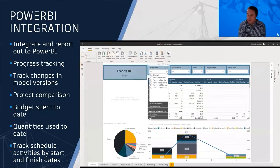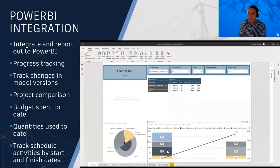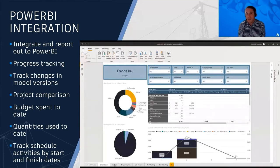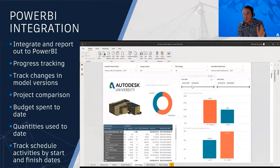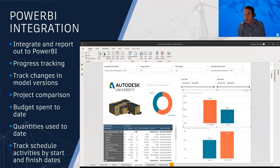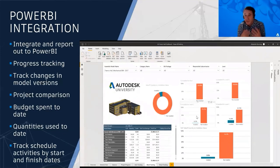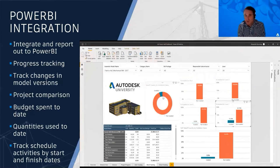To wrap up Assemble: once you've created views in the cloud, added cost data, and linked schedule data, you can connect directly to a Power BI dashboard to report on everything. If people on site are updating installation status live, you can see where you are in the programme and track how much expenditure has occurred to date — a bird's-eye view of the project. We provide two standard dashboards — a single-project view and a multi-project dashboard view — available for free as part of the product.